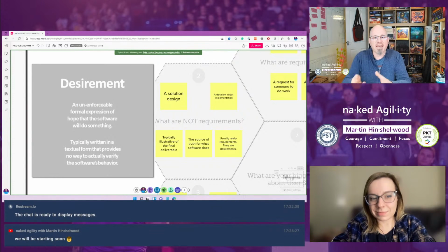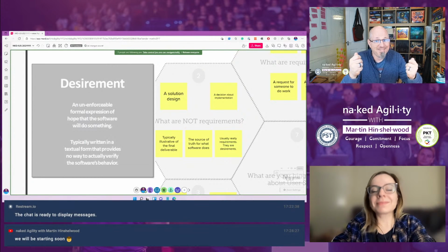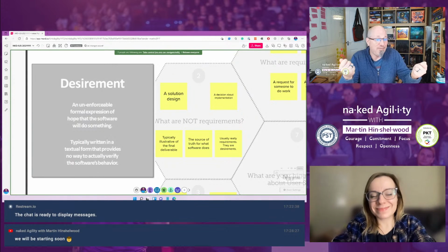Then on the back, you start writing down the answers to the questions you ask as you start having a conversation about it. If you run out of space on the card, it's time for 2 cards.